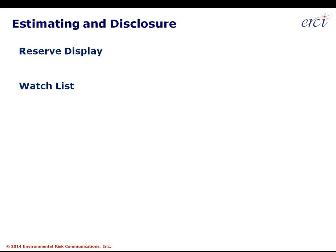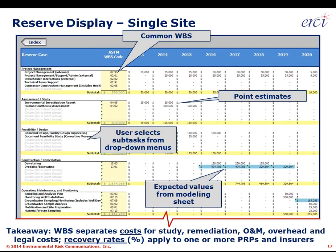I wanted to spend a few more minutes on what estimation and disclosure of environmental obligations looks like, sharing what we found through trial and error that a normal, healthy display looks like in Excel. What helps first and foremost is using a common work breakdown structure — or common WBS — across the entire portfolio. Whether you're using Oracle Financials, PeopleSoft, or SAP to roll information up and compare budgets or forecasts to actuals: if you're coding the proposals, forecasts, and invoices all with the same information, transitioning to a common WBS will pay huge dividends over the long term.